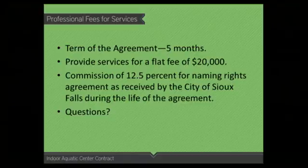And then on any naming rights agreement that is received by the City of Sioux Falls, they would receive 12.5% of that naming rights agreement. And the other thing to point out, and I believe it's the same way with the Event Center, is that as we get paid on any sponsorship and naming rights payments, they too would get paid. So if we get an annual installment, they would get their 12.5% in annual installments as well. Ryan Query, again, is here as well, and will be glad to answer any questions you have about the Legends contract.